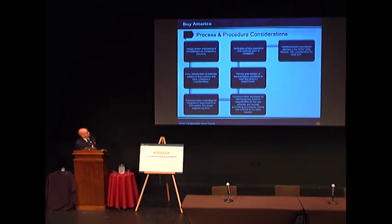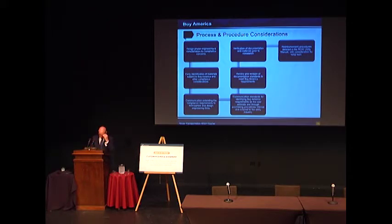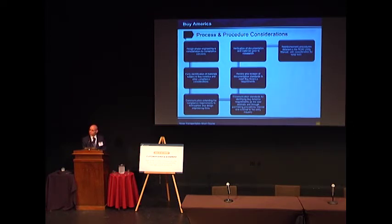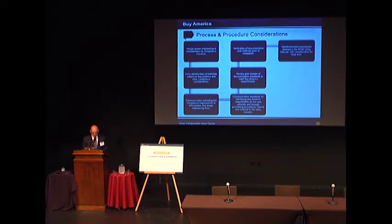Lastly, the reimbursement procedures are detailed in the right-of-way utility manual, with consideration for lump sum. Some of the biggest revisions made to the right-of-way manual were updates to guidance from the Federal Highway Administration, Buy America documentation and inspection activities with new verbiage added, updates for the types of right-of-way releases available through ROAS, additional detail and guidance on cost estimates and lump sum, and further clarifying the timelines that utilities should work off of to submit reimbursements.